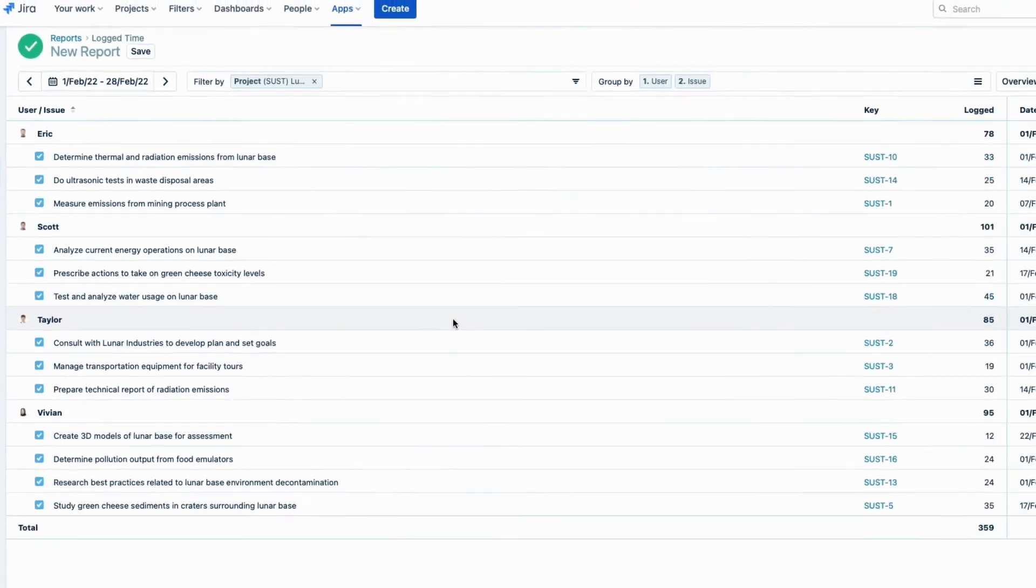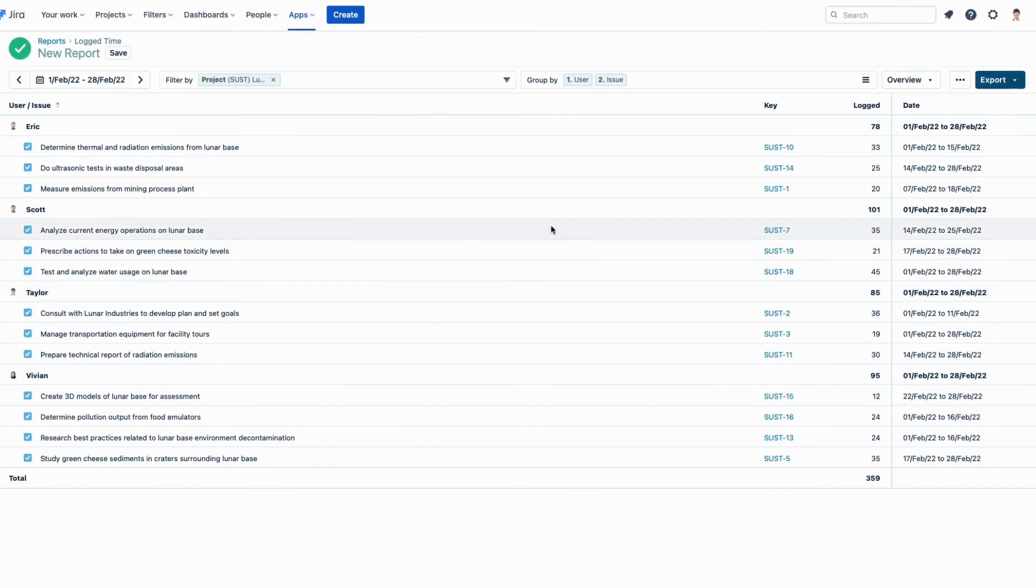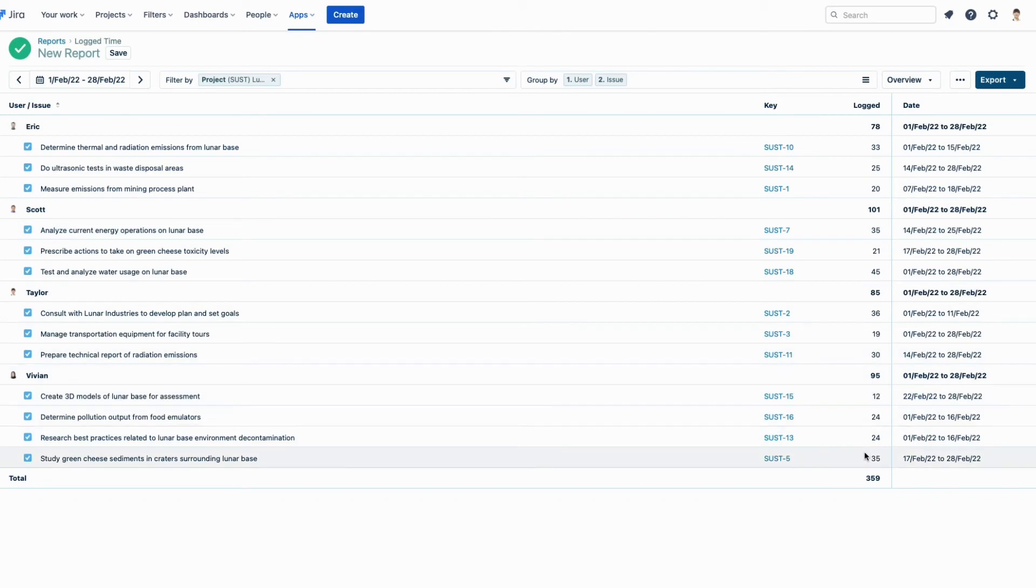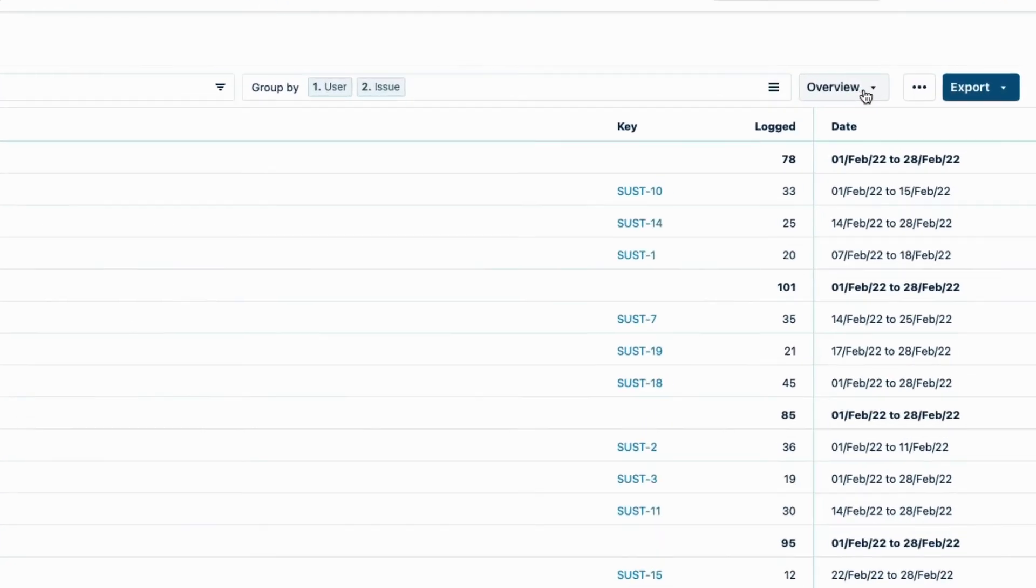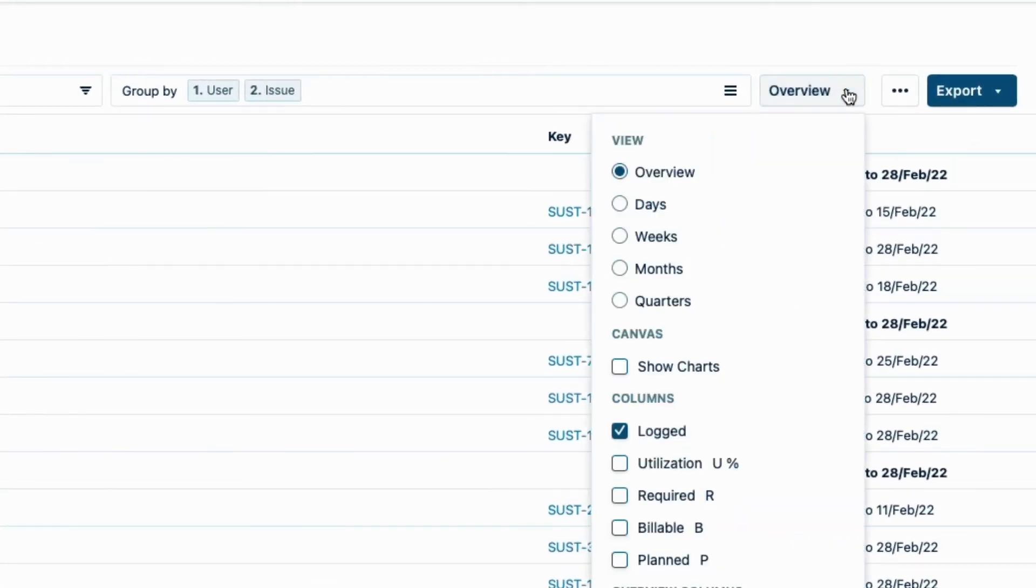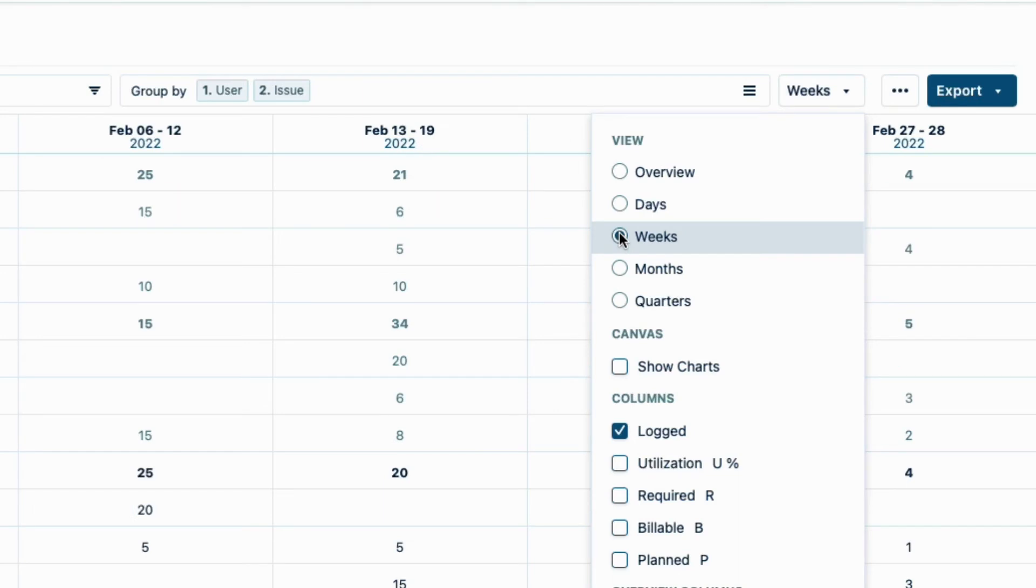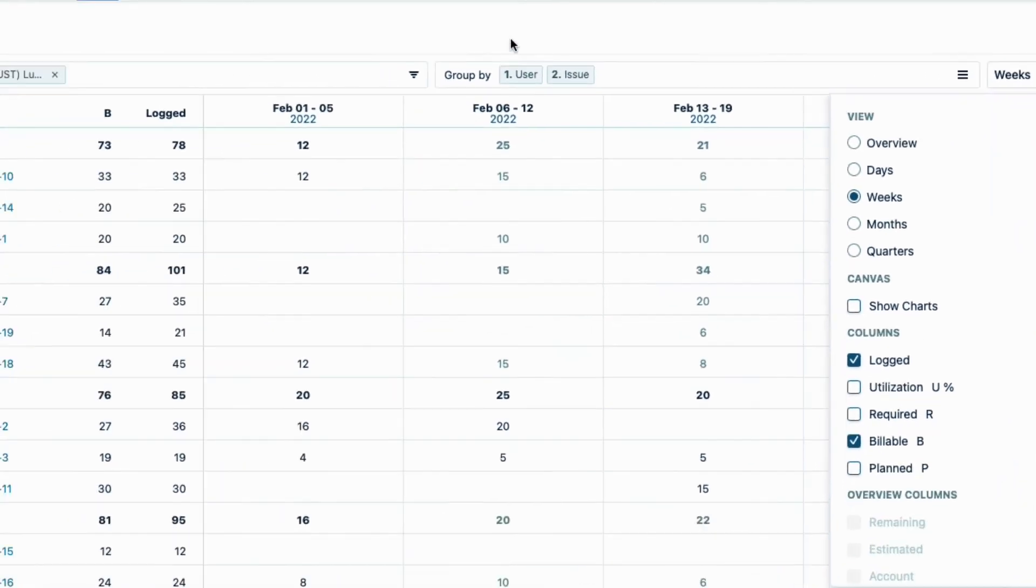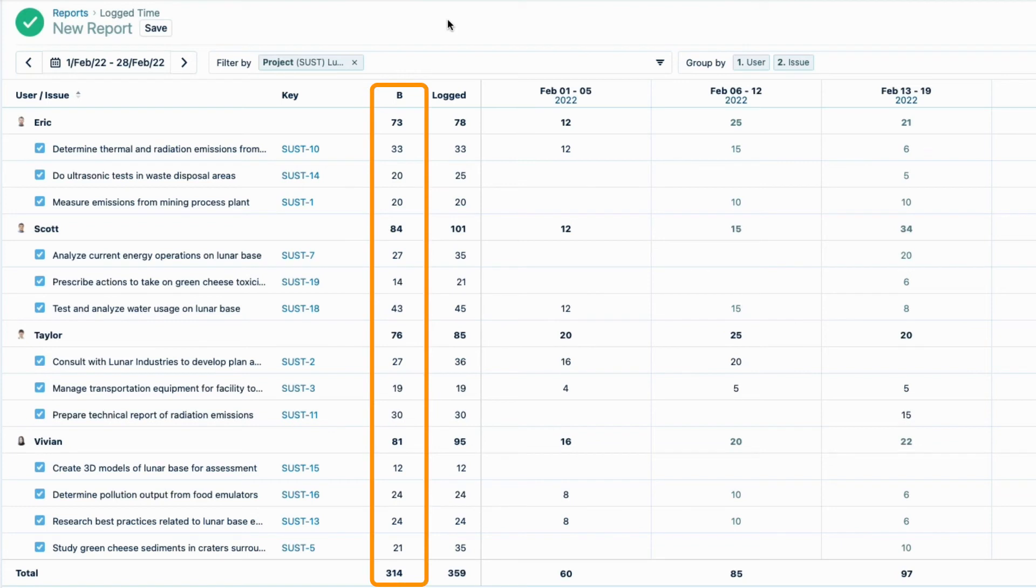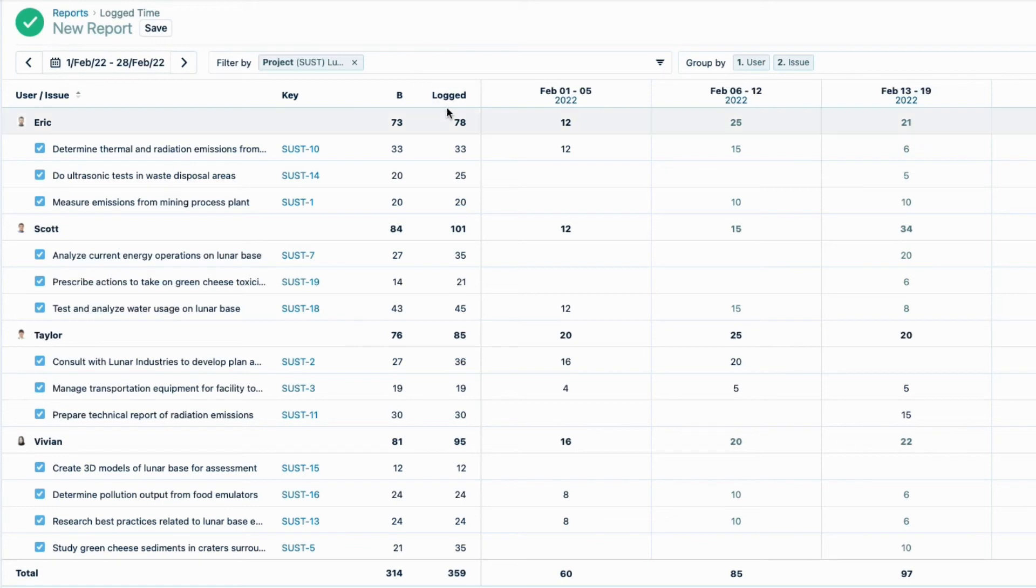And now see all the hours logged by each consultant to the issues in this Jira project, for last month. I'm seeing just an overview right now, but I want more details, so from this menu up on the right, I'll change to Weeks, and that displays the breakdown of hours per week. And while I'm here, I'll check the Billable option, just like I did in my Teams timesheet. Again, these are the hours that we logged in the Billable Hours field, which is what I really want to see here. I can easily compare the logged versus billable hours worked by each consultant, and on each issue.